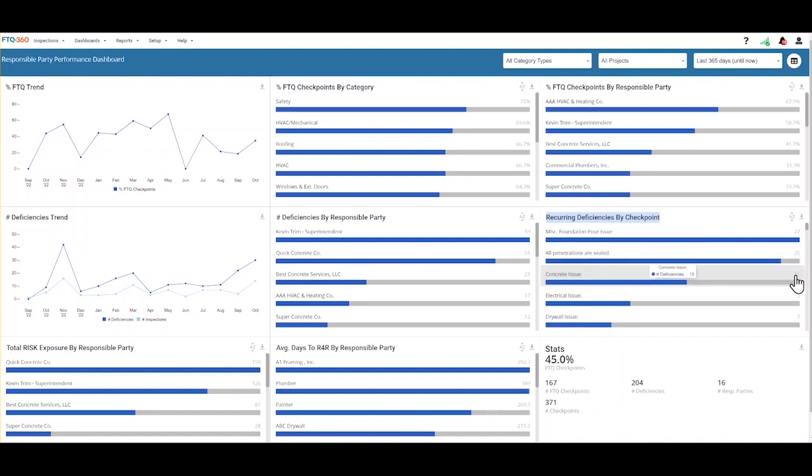Now, in their quarterly construction meeting, the superintendents are determining the root cause of these three top issues, developing an action plan to stop them from recurring, and implementing that plan across all projects. They get their entire construction team focused on preventing those three issues from ever popping up on their job sites again. That's not only protecting their cycle time and saving wasted time and money, but freeing up the superintendents from dealing with those repeating, avoidable headaches.